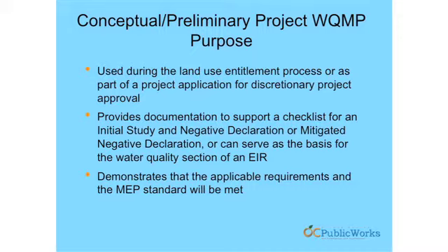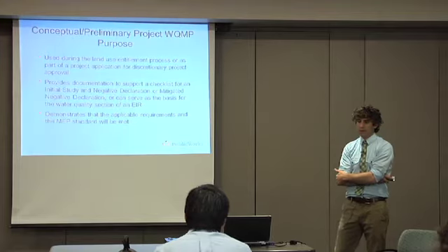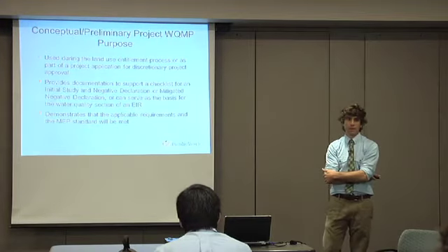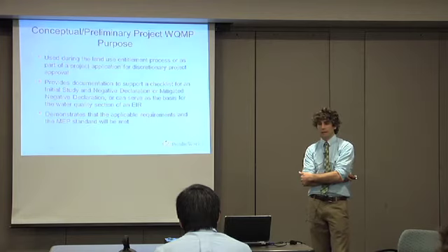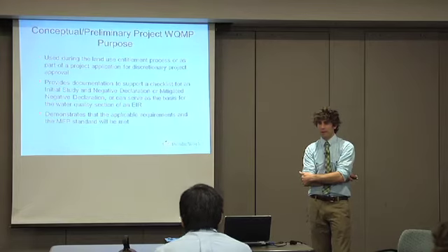And it's the first thing that you are going to see on an official basis, although what we'll talk about is the significant implications that some of these requirements have on site design, as Daniel mentioned, avoiding sources of sediment, as I've talked about, making sure you have enough room in your site for these types of BMPs. The earlier developers know about these requirements, the better. And so there's probably no official way for you to reach out to them prior to the time when you see the conceptual WQMP, but if there is a way to have a pre-submittal meeting before they go too far down the road, I think it can save people a lot of grief.